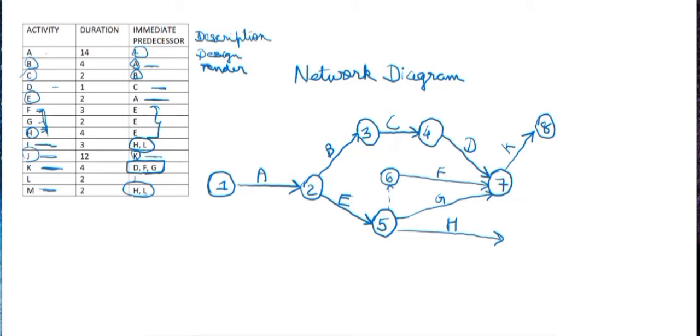That is, we'll take out the next arrow from node 8. This will be activity J, and here it will be node 9.